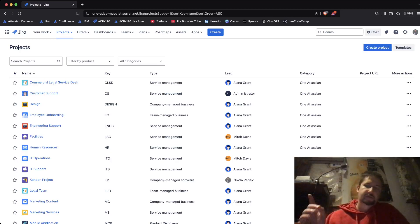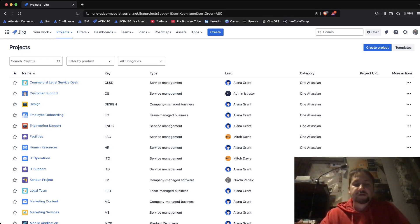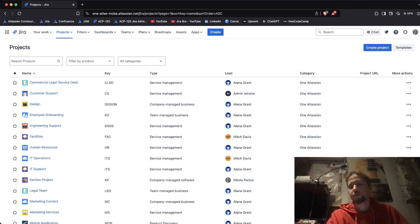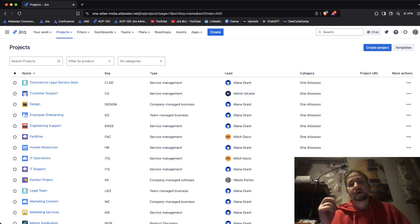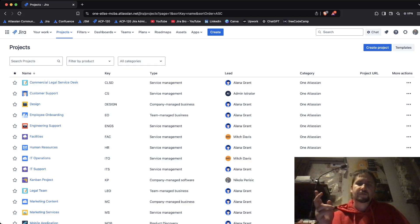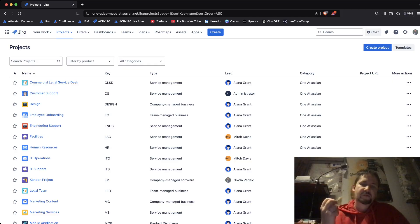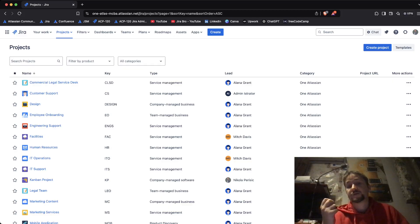Hey guys, it's your bro back with another video. In this video I'm going to teach you how to bulk move your issues from one project to another. You need two permissions: from the source project you need the edit issues permission, and for your destination project you need the create issues permission.